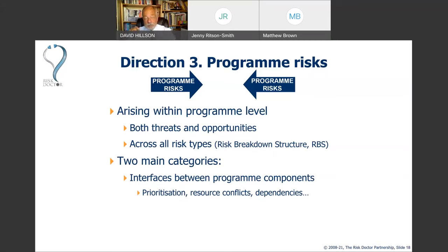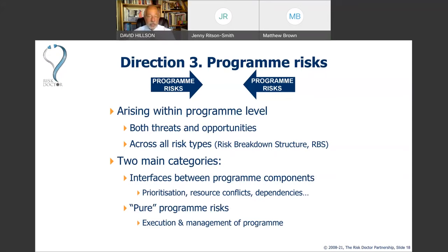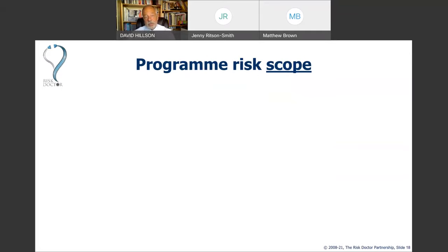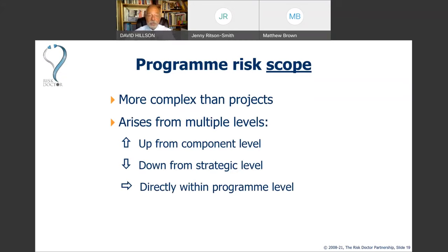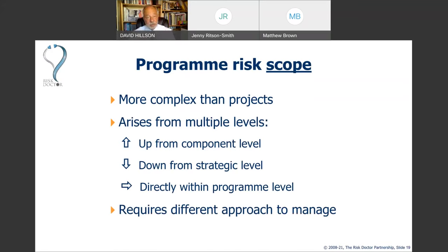There are also what we might call pure programme risks — to do with our management of the programme and how we execute the programme components as a complete programme. We've seen there are three different directions where risk arises at programme level: from below, from above, and at the programme level itself. Because this is more complex than what we find in projects, we need a different approach to manage the risks that could affect us at programme level — we can't just take project risk management and do it at a higher level.